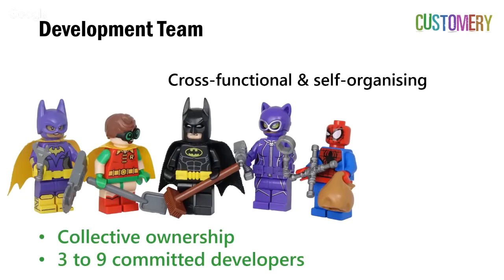So at that stage, if you're looking at 10 developers in your team, then I would recommend you run 2 Scrum teams. And in my current project at the moment, we have 12 people split up into, we call them squads. So we have 2 squads of 6, and we have a Scrum Master who coaches both of those squads.